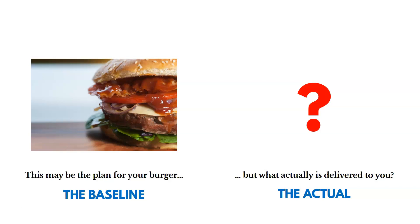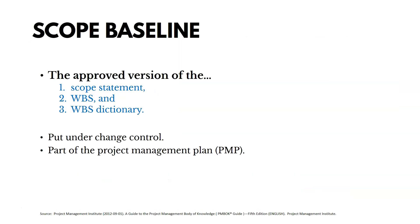The scope baseline is the key output of the Create WBS process and includes three things: the scope statement, the WBS, and the WBS dictionary. The WBS dictionary is basically a description of the items or work packages in the WBS. We're going to put the scope baseline under change control as part of the project management plan, which includes things that end in both 'plan' and 'baseline.'